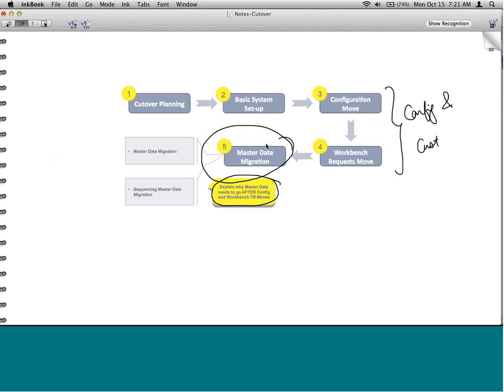After that, transactional data moves. I hope you understand the reason why. If you create an order in a system without a customer existing, it will fail. So master data needs to go before transactional data. If you create a master data with account Z001 account group, and if Z01 config does not move, then again we have a failure point.